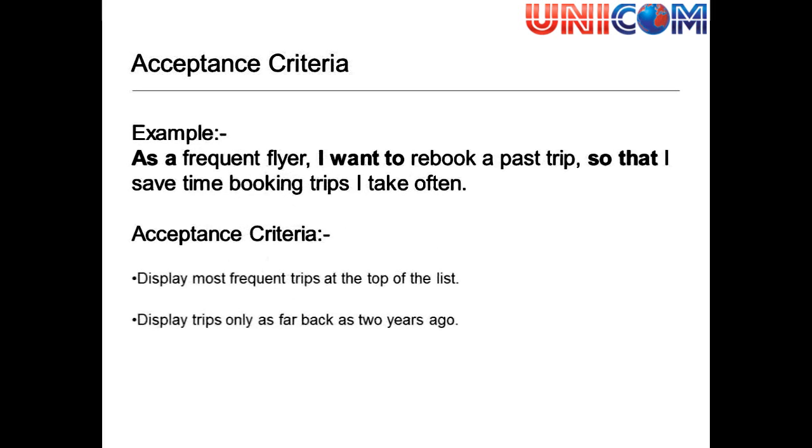So as well as the user story, what we're looking for is acceptance criteria. And I think this is where you really want your testers engaged with this part of the requirements capture, because testers, in my experience, they ask the right questions here. So you'll need to spend some time and add, just bullet points is fine, to augment the user story. It's things that you know about that user story that need to be captured, that will verify that user story does what we expect it to do.